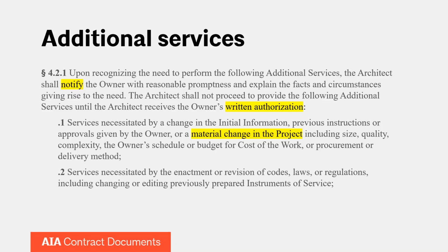There are a couple of different types of additional services. I'm going to flag a couple that I think might come into play. The first example that I thought of is if owners are asking you to scale down a project in some way because their budgeting issues are, they want to hold on to cash more, or they're not as comfortable spending the type of money on a project that they were a few months ago, you might be asked to readjust your design due to a changed budget in some way, or a budget that's been lowered. And if that's the case, you'll want to look at section 4.2.1,